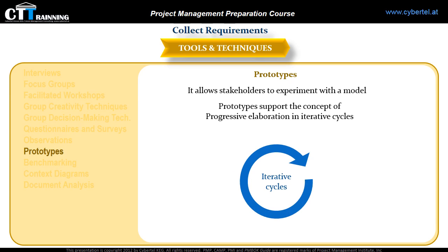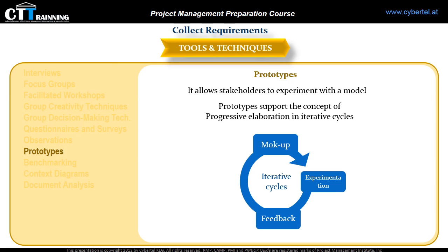Prototypes support the concept of progressive elaboration in iterative cycles as shown. Mockup creation, user experimentation, feedback generation, and prototype revision. When enough feedback cycles have been performed, the requirements obtained from the prototype are sufficiently complete to move to the design or build phase.